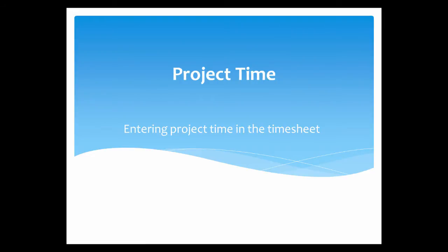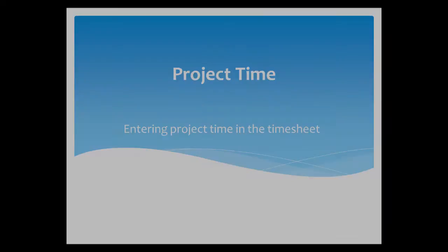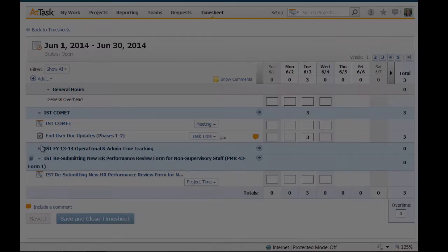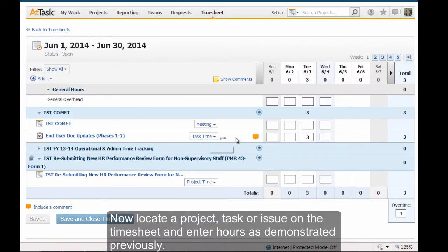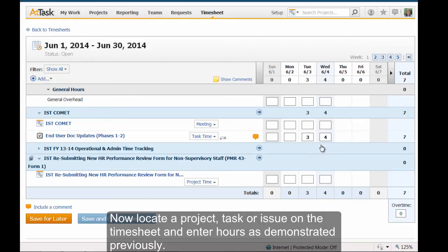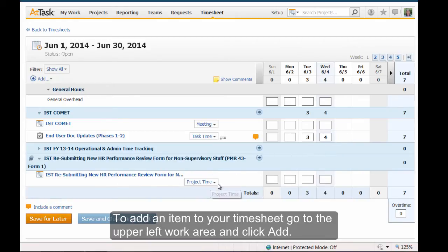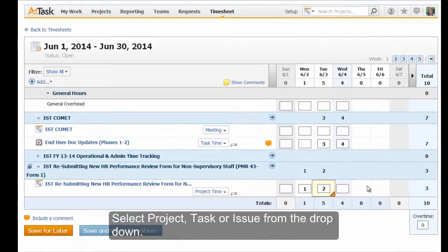Project Time: entering project time in the timesheet. Locate a project, task, or issue on the timesheet and enter hours as demonstrated previously. To add an item to your timesheet, go to the upper left work area and click Add. Select Project, Task, or Issue from the dropdown.